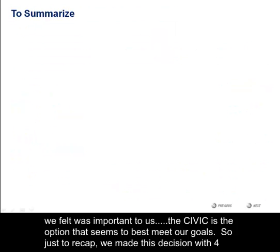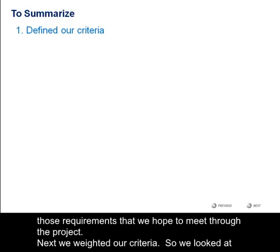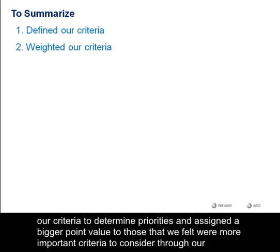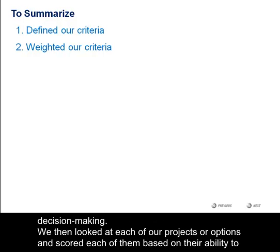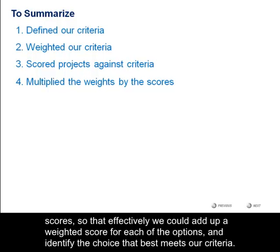So let's recap. We made this decision in four simple steps. First, we decided on the criteria — what criteria are important to us for our decision? What are those goals, those needs, those requirements that we hope to meet through the project? Next, we weighted our criteria — we looked at our criteria to determine priorities, and we assigned a bigger point value to those that we felt were more important to consider through our decision-making. We then looked at each of our options and scored each of them based on their ability to meet these criteria, setting up a very simple scale to help us do this. And then finally, we multiplied the weights by the scores so that we could add up a weighted score for each of the options and identify the choice that best meets our criteria.